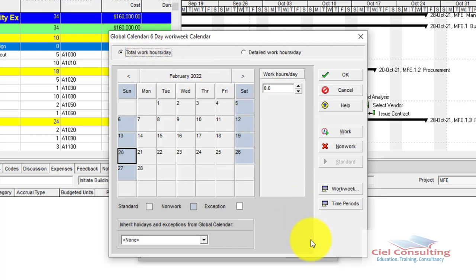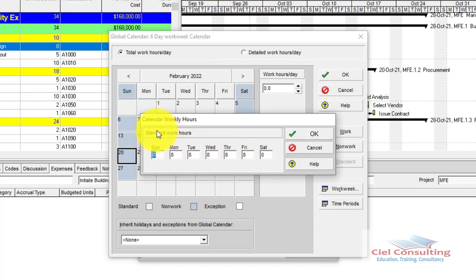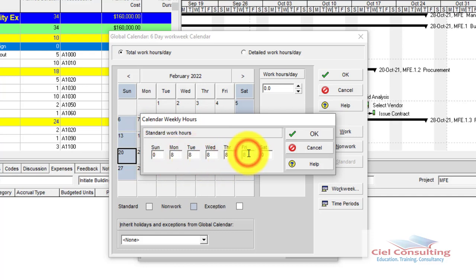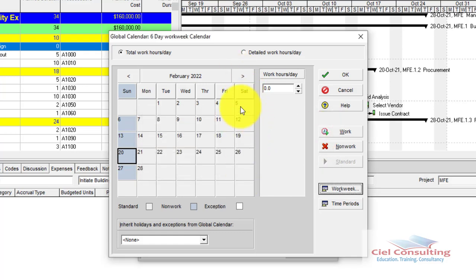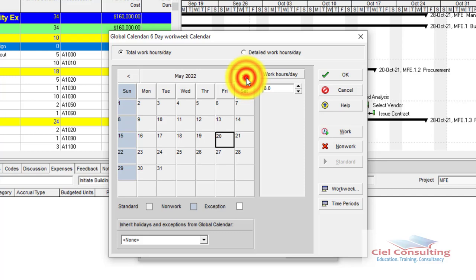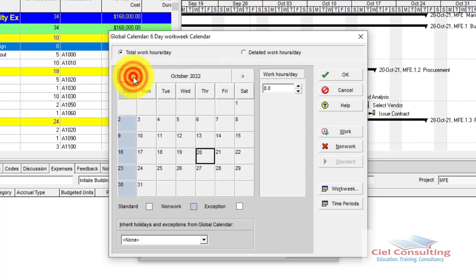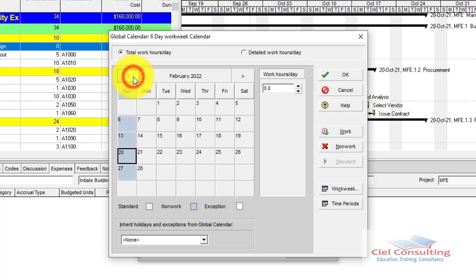Starting with the Total Work Hour/Day method: make sure you're on that tab, then click Work Week. The Calendar Weekly Hours window appears, showing eight hours each for Monday through Friday, with Saturday and Sunday showing zero. Simply remove the zero for Saturday and type eight. Click OK, and you'll notice the gray for Saturday disappears — Saturday is now a working day. Checking other months shows the same result.